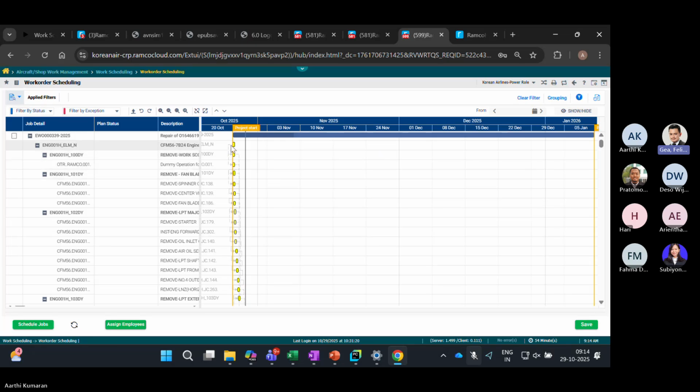And how do we define the activity like that in simulation? You mean the list of tasks and how they have to be executed? Okay. It's part of the task repository, it's a setup. So once you have the tasks inducted from your manual, all of these tasks will be put together in what we call a repair scheme definition.